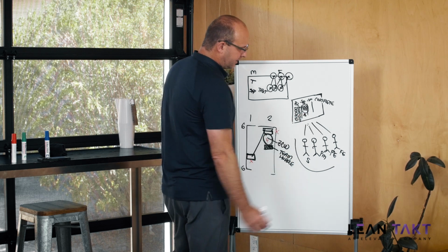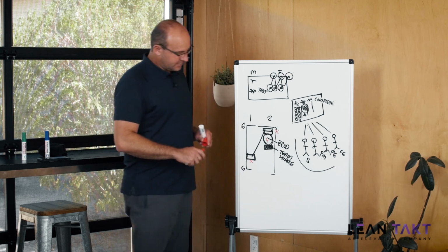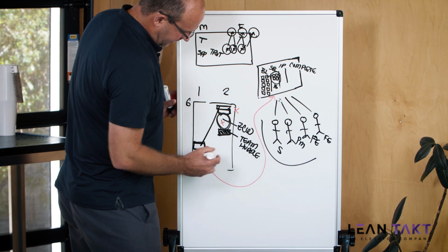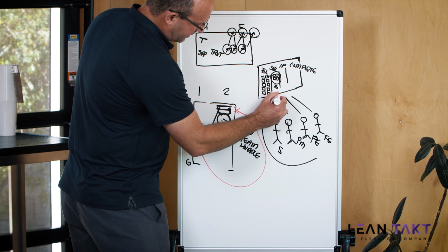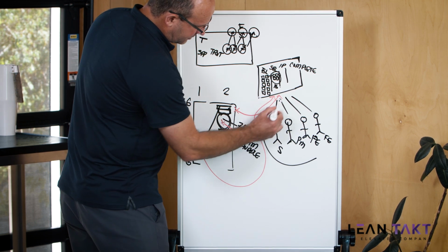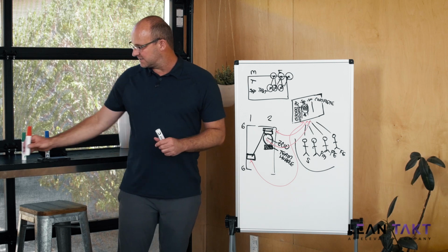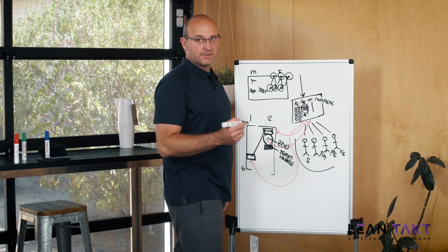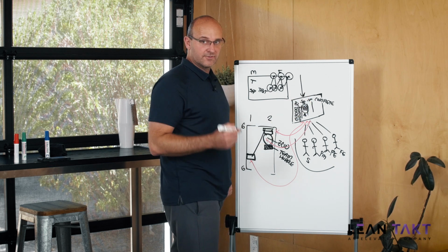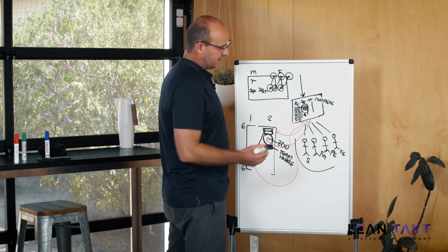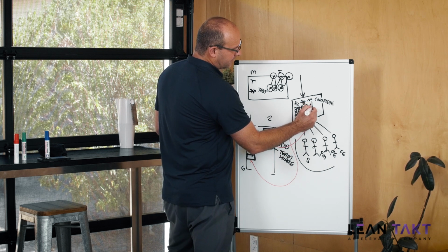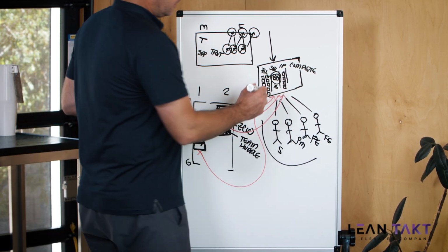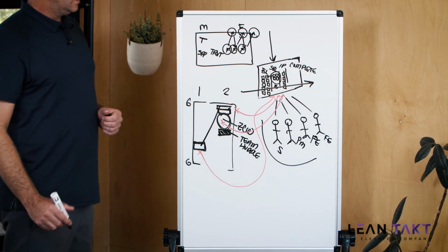But you're also going to have a buffer in there so that if you have issues, and you will, from the afternoon foreman huddle, they can go in there. From the morning worker huddle, when workers give you feedback, they can go in there. And your zone control walks, they can go in there. The key here is to have enough capacity to create flow for the field. And right here, this is where the superintendent and the PM align to make sure that we're working on first things first, that we're working on the most important thing. That way, these humans can bring one at a time, because we're working a one-piece flow, their items into the in progress column, and we're attempting to get these moved over to the right as fast as possible.